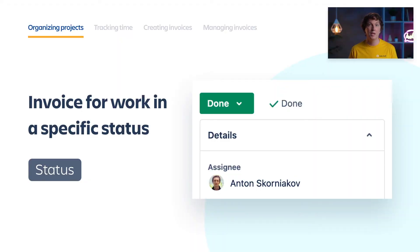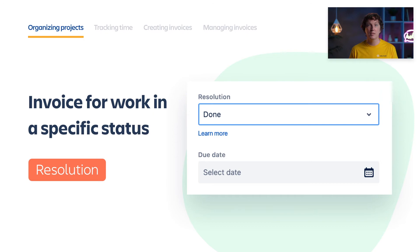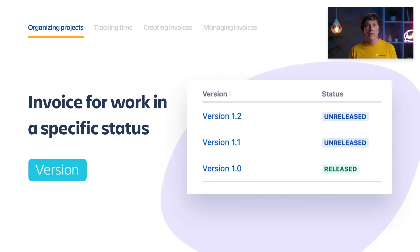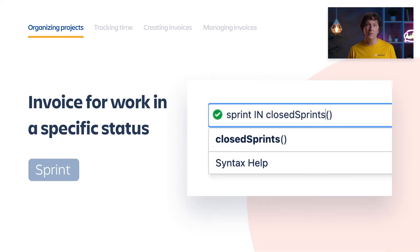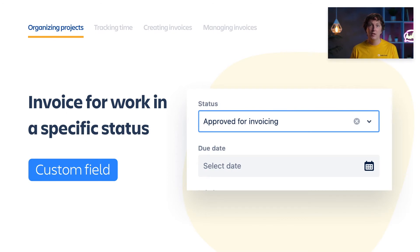Sometimes you need to separate time for work in a specific status. If you need to separate time for completed tasks or closed support tickets, the native way is by issue status. If closed tasks may have multiple statuses like 'done,' 'can't reproduce,' 'skipped,' etc., you can use the single resolution field — if it's not empty, it means the issue is resolved and ready for invoicing. If you use Jira versions to group your tasks, you can separate time for released versions only, which works natively in Jira. If you go by sprints, you also have a native way to separate time for completed sprints. And of course, you can use a custom issue field if built-in options don't work for you.